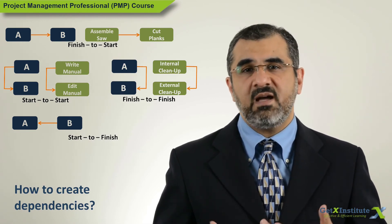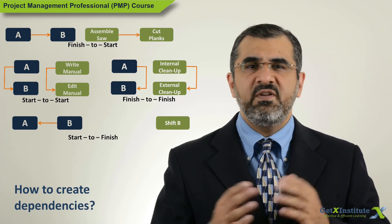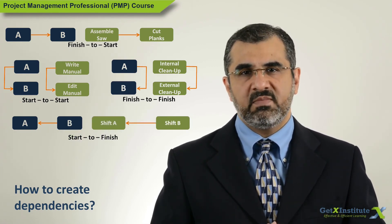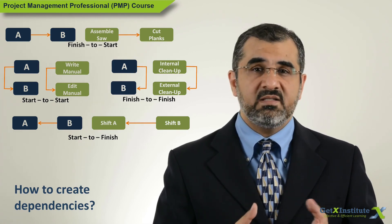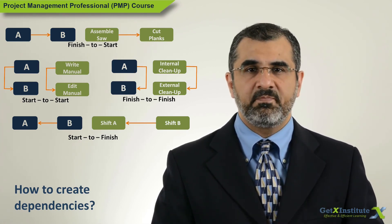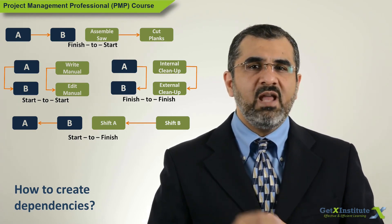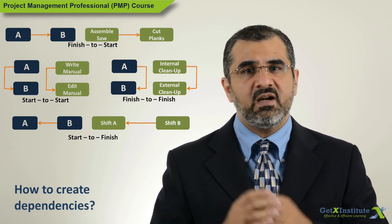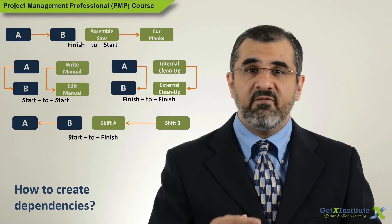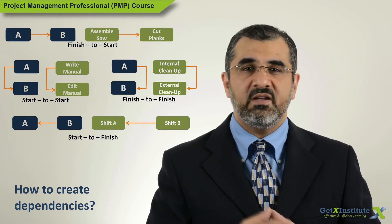Here is an example to explain this relationship. A security guard finishes shift A at 5 PM and the other security guard starts shift B at the same time, at 5 PM. There cannot be a gap between the two. If the second security guard is late and did not arrive on time, shift A will continue and will only finish when shift B has started.